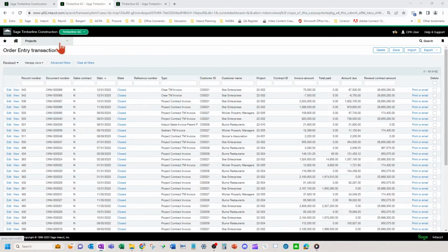Okay, for progress billing, there is a different approach to progress billing. The first thing, though, is if you have sent the invoice to the customer and they have rejected the invoice, you can then do the same thing where you will be able to delete the progress billing or the AIA, just like the time and material. It will reset it back to the prior application.